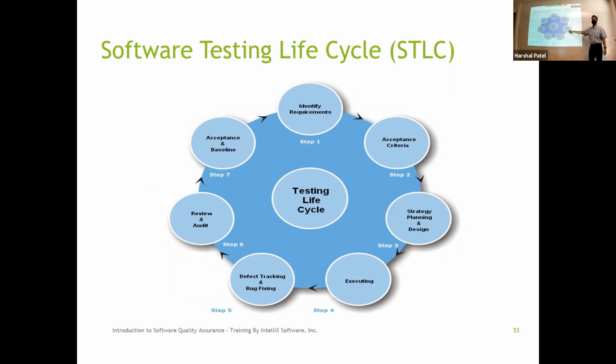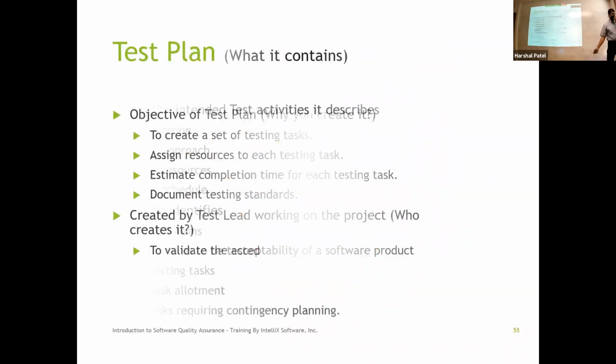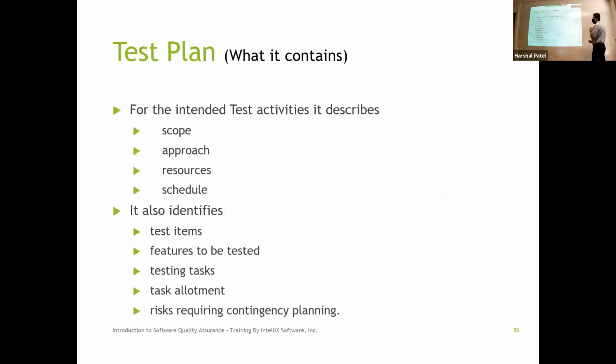How long is it going to take you to write each one of the detailed design step-by-step instructions? How many times do you guess you need to execute it? And how much time is each execution going to take? So those things are all part of the schedule. What all things I'm going to do, how long it's going to take me, and in what order I'm going to do it.